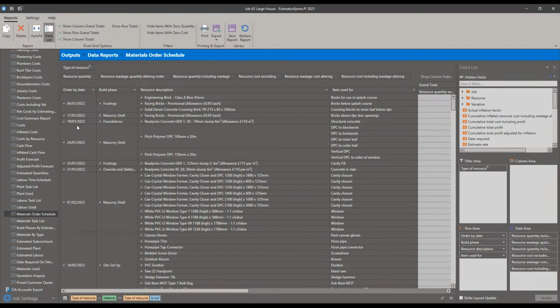Now, the software's one is a very generic one. It's based on the standard lead times assumed for those types of materials, their supply chain in an average year. Of course, currently it's not an average year. It's not been an average two years.